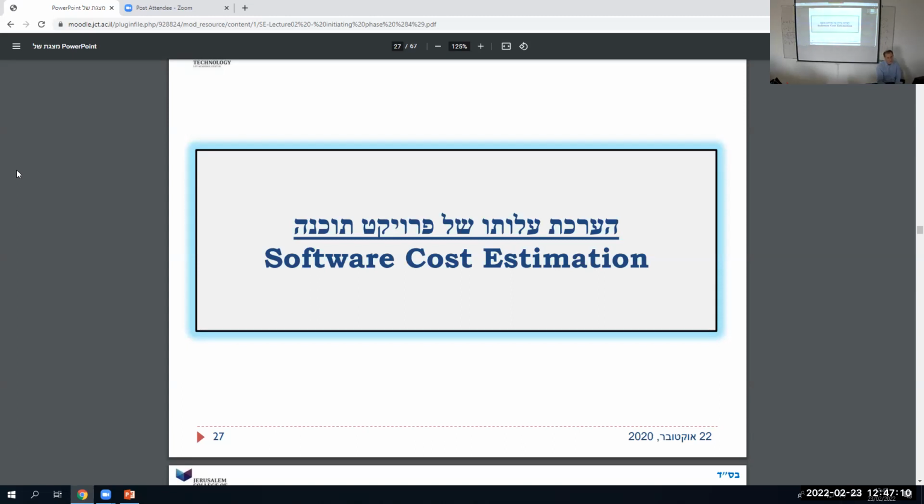What they did was backwards analysis. In other words, they took projects that already were built and asked, how many lines of code was this project? They measured it in thousands of lines, so it's called KLOC, kilo lines of code. Oh, this project was 100,000 lines of code. How much did it cost? $1 million. So every program with 100,000 lines is $1 million, so each line costs, you can figure it out.